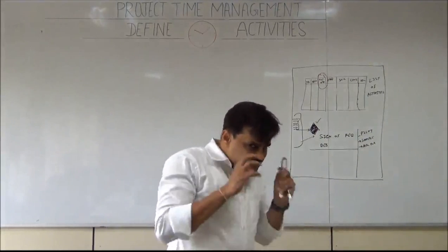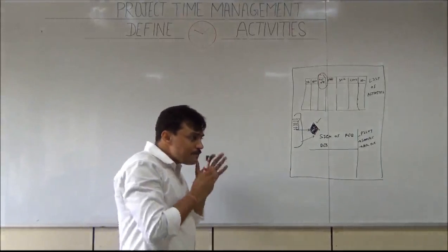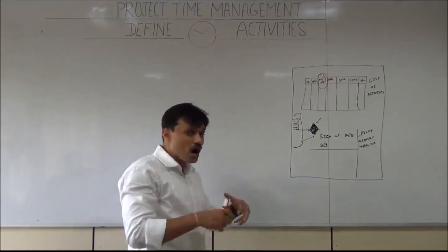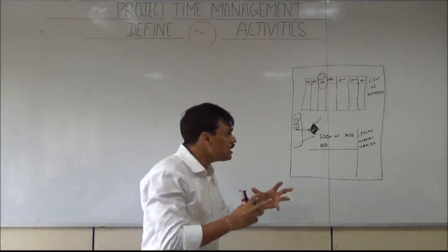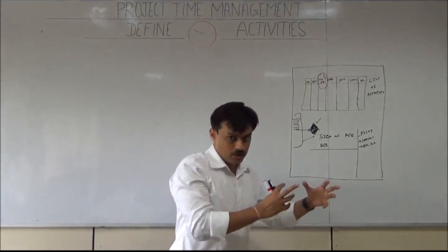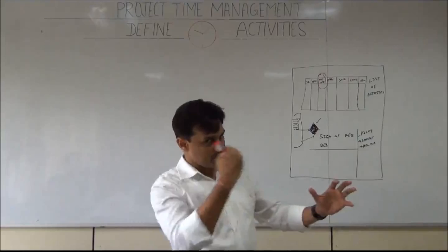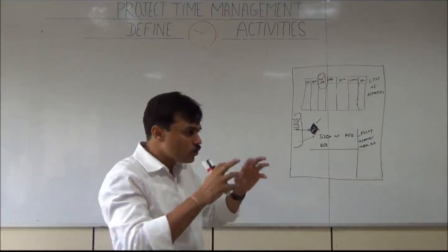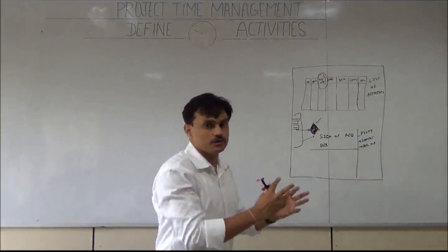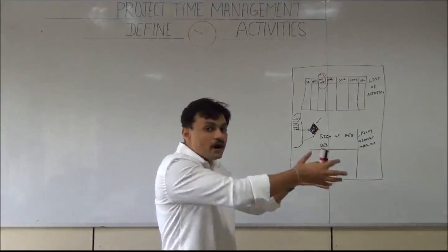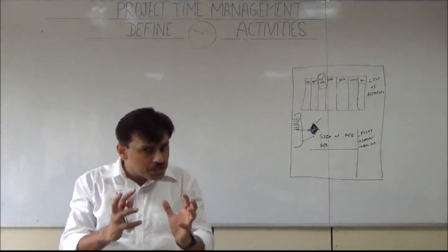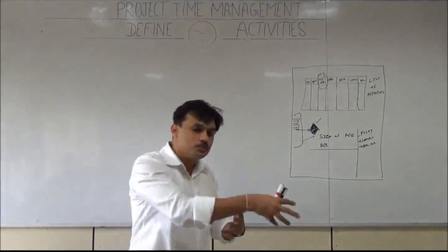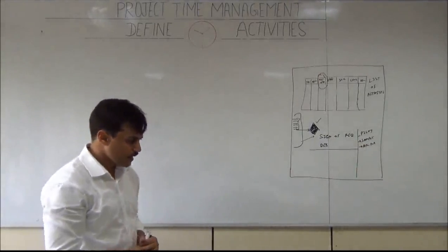Now, discrete effort is a type of activity which generates output, meaning it directly produces deliverables. For example, in software development, coding is a discrete effort because it generates the required output which will be consumed by the end customer. So discrete effort activities are those which directly contribute to the output.